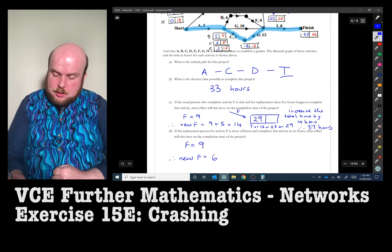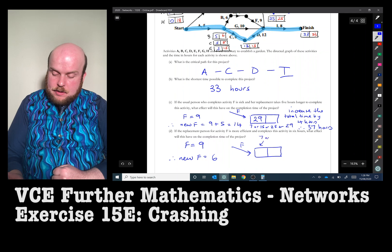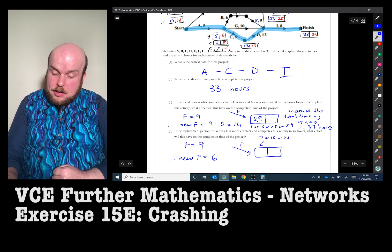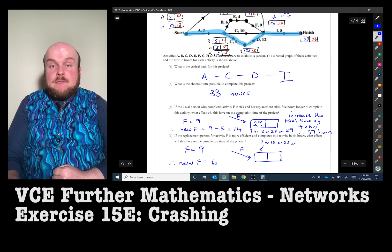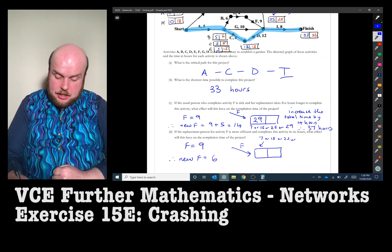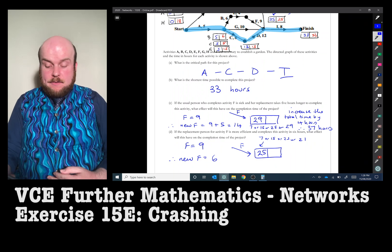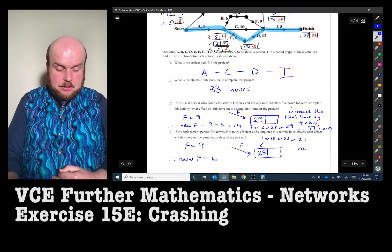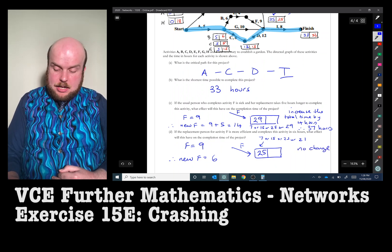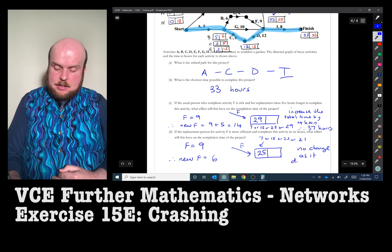So therefore, F goes into this box. The choices are seven or 15 or 25, or 15 plus six, and 15 plus six is 21. So what that means is that the largest number is still 25. Therefore, no change, as it does not affect the critical path.